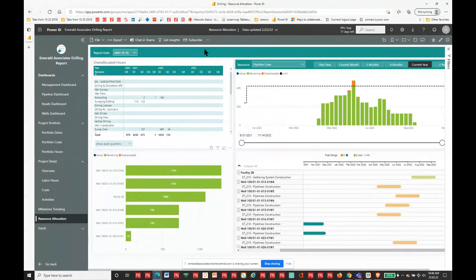Now for projects that do rolling wave updates, this works absolutely awesome. You don't run into the situation where somebody looks at information in P6, not realizing that the information that's being discussed at the meeting is as of close of business the Friday before. Somebody's put an update in and the meeting is the following Wednesday. That sparks a lot of discussions that take up a lot of time, create a lot of frustration, and they really don't have to happen.